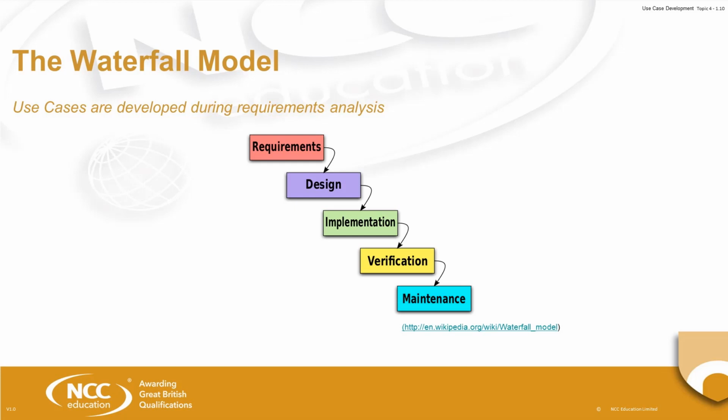So you can choose the use cases as high priority, being the ones that are going to most adequately demonstrate what it is that you want to demonstrate through your project. So in the requirements phase, you'll create a set of all possible use cases for the system that you want, and then you'll decide which particular parts of the system are the most important to you for your project and prioritise those as priority number 1.